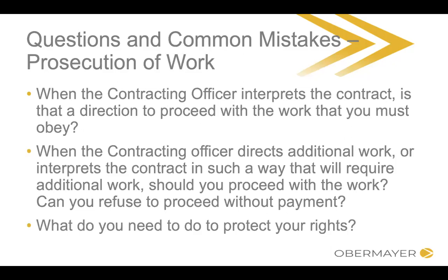This is going to circle back to the questions I got earlier about what you can do in terms of refusing a change. Quick answer in response to the question I got: no. If the contracting officer changes the contract, you can't refuse to perform the change unless, going back to something I said earlier, it's a cardinal change, which is very, very rare in terms of government contracting. When the contracting officer issues a change to the contract, you need to perform whatever they told you to do.